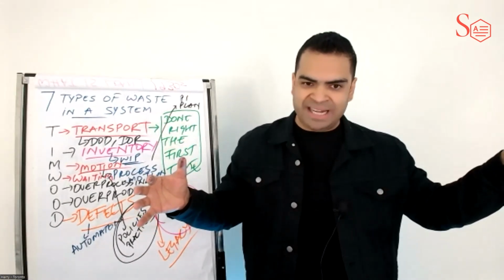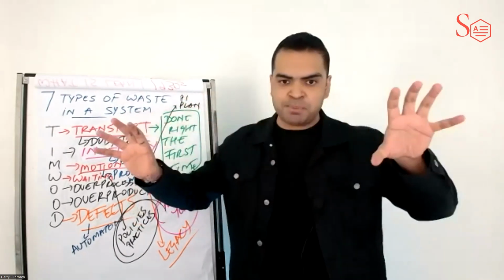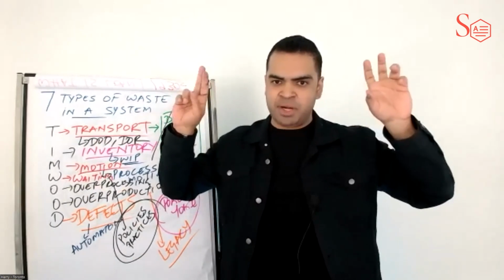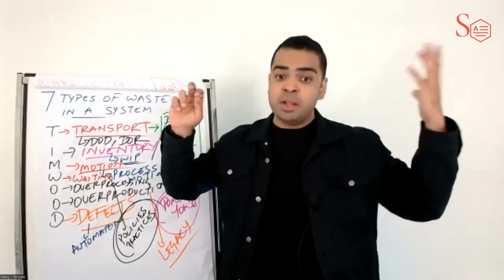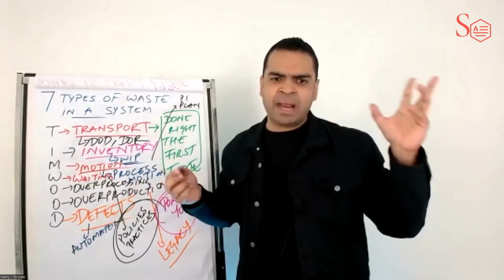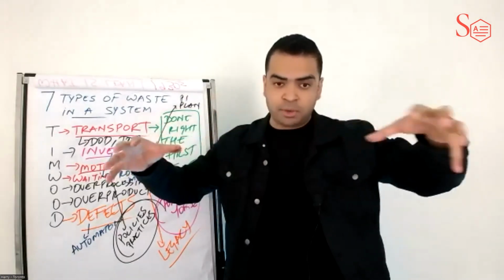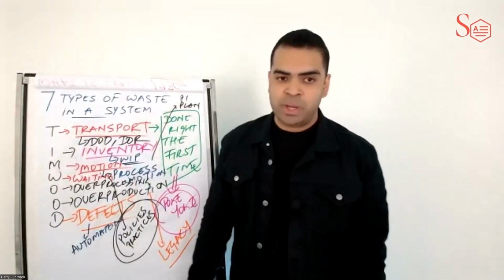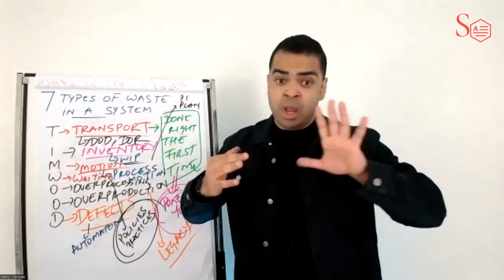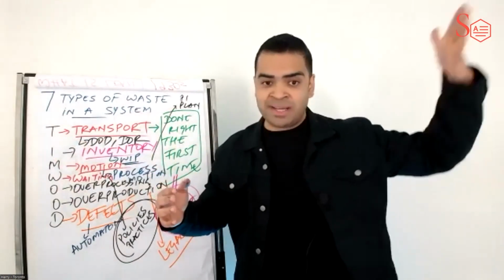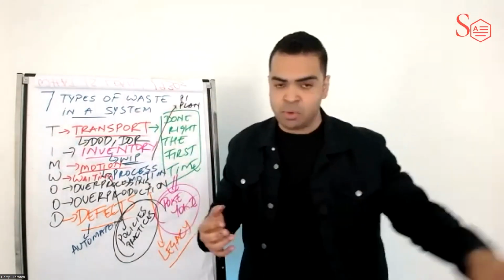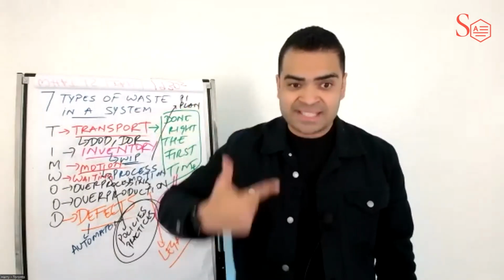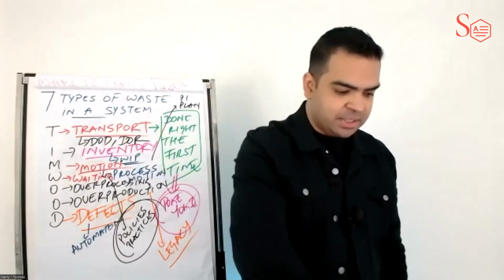Have you seen people or teams, they write code for multiple sprints and then they integrate it? Sometimes they call it hardening sprint. Anybody's heard of this term, hardening sprint, right? Some companies use that slang, which basically means that we're going to work for 3 sprints, and then in the 4th sprint, we try and integrate all of this code that we have written and see if it's actually working. And then they run into a bunch of bugs, defects, and they keep going around in circles. So this automation allows us to run those tests more frequently and get faster feedback.